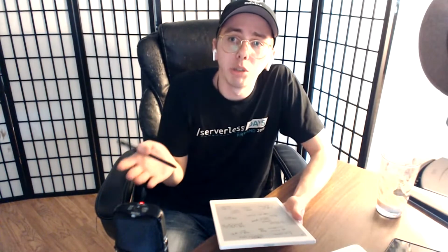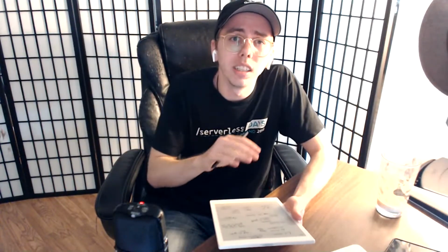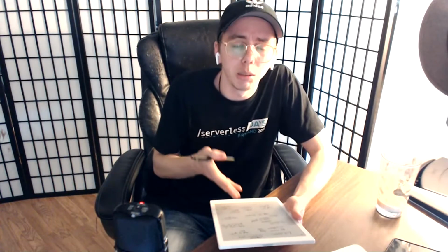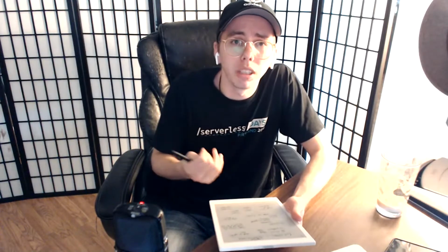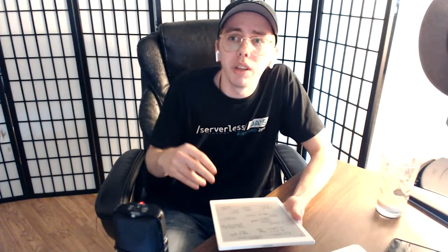And you can even share that out to people that aren't inside your team, that would maybe be evaluating, like maybe an engineering manager or somebody above the engineering manager. They could quickly look and see what is the progress of the project. It's also very nice because it tracks how many things are actually getting done. And so then you can create, I want to say, a burn chart, but it's basically showing how fast you're finishing tasks and getting things done. And based on that, you can use that as a business value metric to share with leadership. And they can either, one, choose to go faster by adding additional people, or they can very easily get feedback into what the team's actually working on, and then make adjustments.